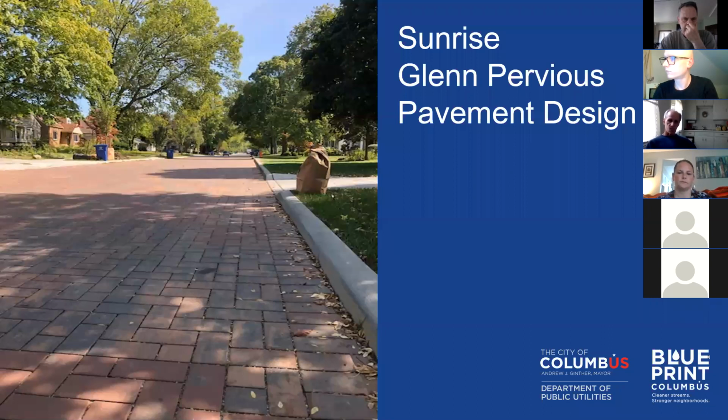And similar to Patrick's area, we are also proposing those permeable pavement locations. So I won't talk about those at length, other than to maybe note some of the constructability considerations with them, because of the nature of them and the massive amount of soil that needs to be excavated for those. Those typically require street closure in order to accomplish it. So just from a constructability standpoint, that will be something that we will discuss more as the design progresses. Go ahead, next slide.